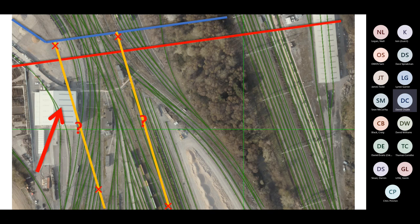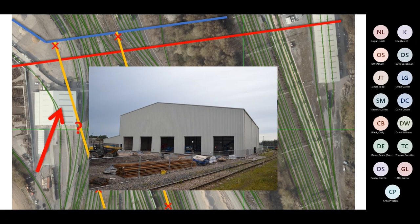That picture I just showed you, and about a few hundred meters down, all the rest of it, we tried to jet and we've had to curtail every single time because the water is coming in too fast. Why? Because when you don't have a drainage system that works in a flat area, you have this huge head of water that the moment you suddenly create a nice area for the water to go into will suddenly appear in your pipe. Yay! Anyone wonder why one of the pipes may not be working? Almost like in 2016, we built a piled structure over the top of one of them, and we've probably put a pile straight through it.